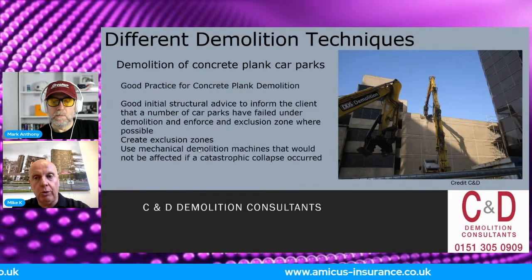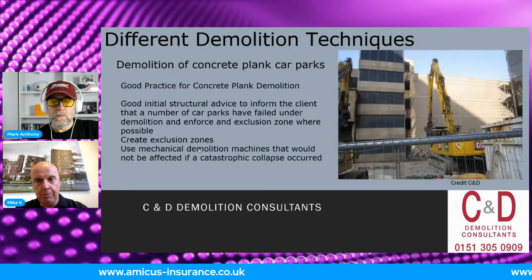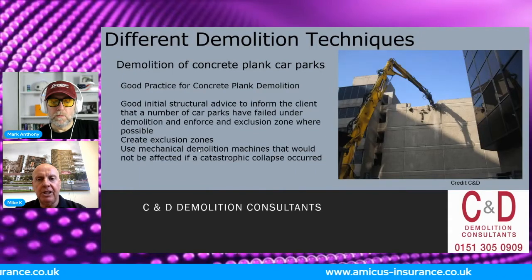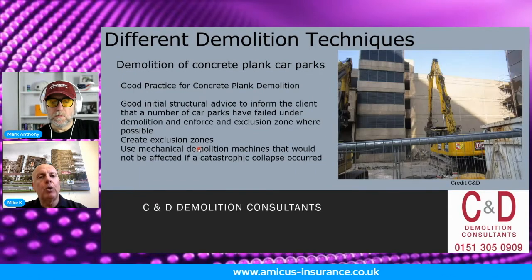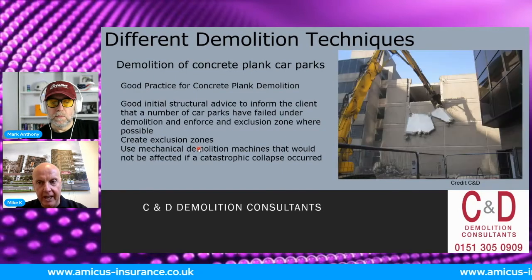Create exclusion zones. Why exclusion zones? Because we know buildings fail, especially under demolition. Use mechanical machines where possible, away from the building, so that if it does fail, no one is going to get hurt.